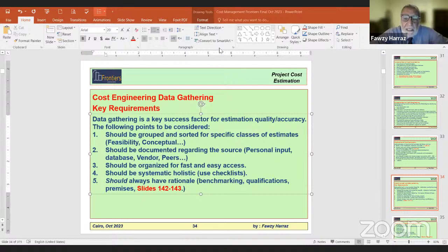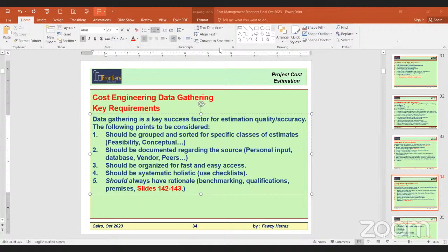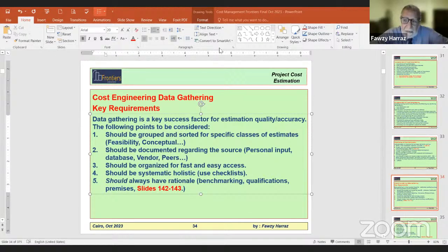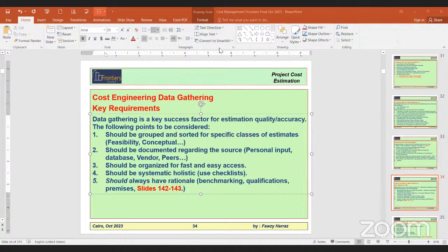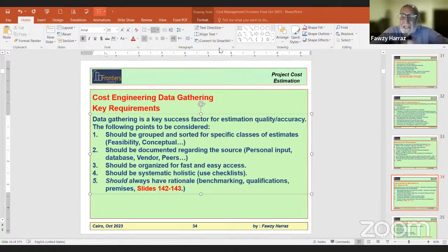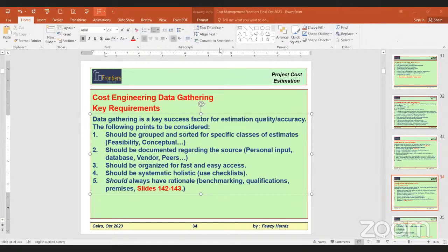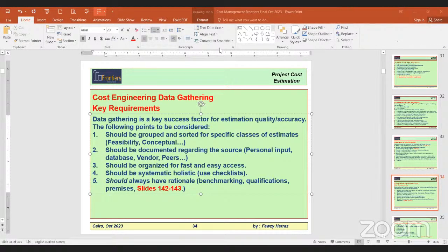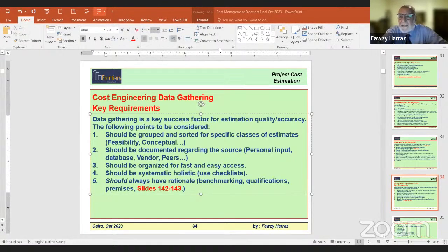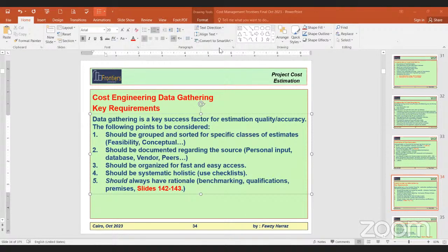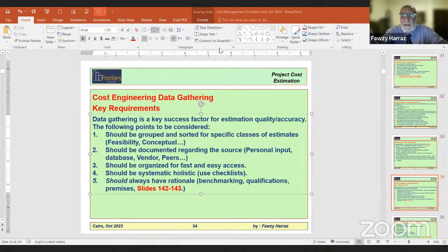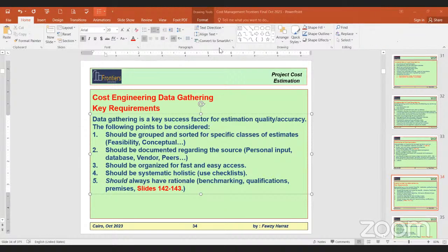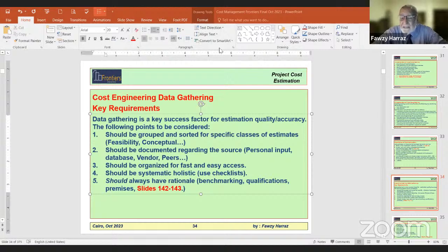If the project is here in Egypt, you assume? Let's say so, yes. If it is in Egypt, use an Egyptian estimator. The experts do not know the Egyptian market as you do. They will really make assumptions. We have seen this on estimates made by Snam Progetti and Bechtel for projects in Egypt. There was lots of lack of knowledge and they make assumptions and they apply their norms and rates to the case here, and you could easily challenge and invalidate their figures.